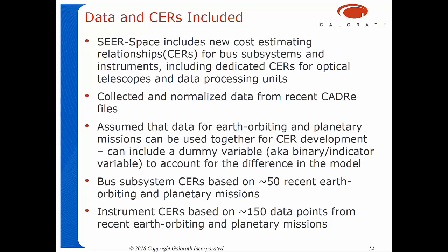And then the CERs that we include in SEER Space: we developed new cost estimating relationships, which I'll refer to as CERs, for the bus and for the instruments, including dedicated CERs for optical telescopes and data processing units. And again, that's based on NASA data. And we assume that the data for the Earth orbiting and planetary missions can be used together. Basically, you can use a dummy variable, aka a binary indicator variable, to account for the differences in the model. The bus systems are based on over 50 recent Earth orbiting and planetary missions, and the instrument CERs are based on even more data than that.